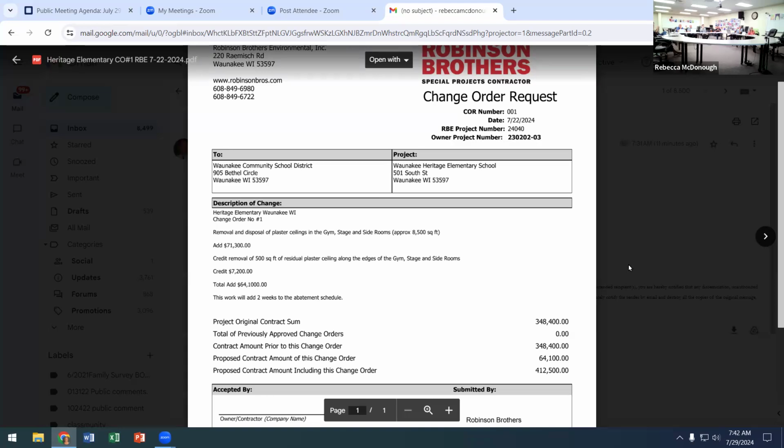That plaster material, if you're dropping an entire plaster ceiling, typically goes for about $10 to $12 a square foot. We've done those before and have enough history to know what those go for. So we're offering something about $8 a square foot, which is partially because they're already on site, but they're also doing the best that they can to help us with this.